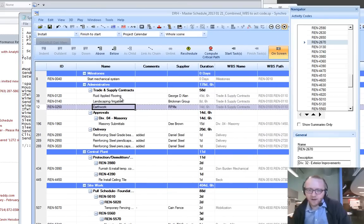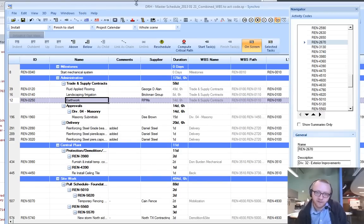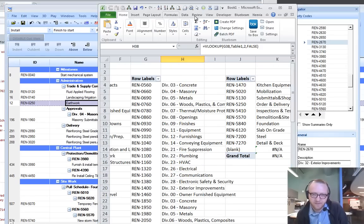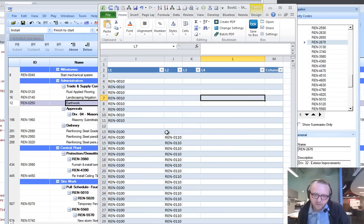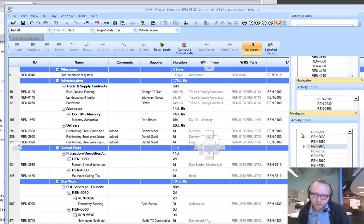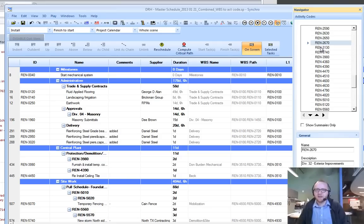I've currently got a task in front of me where I'm trying to go from a Synchro work breakdown structure schedule to an activity code schedule so that we can do an organization by trade. Now, on the surface this isn't possible — this is functionality that we can only get in P6. But I know I can go from Synchro's WBS name, pull over the path, do a text to columns, call this my activity codes, go into Synchro, make four columns for level 1, 2, 3, and 4. But then what I end up with is this list of activity codes that doesn't have the proper description.